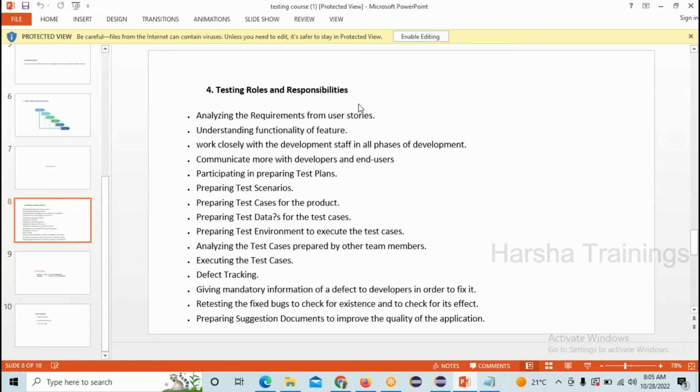User stories is nothing but whenever the customer comes to the software company, the customer tells their requirements. I need a login page, I need a sign up page, I need an add to cart button. Whenever the customer selects a product, that product has to be added to the cart. These features have to be explained by the customer to the software company. Once the project is confirmed and the agreement is completed, the business analyst, scrum master, developer, tester, project manager and architects all together arrange a meeting and divide the user stories.